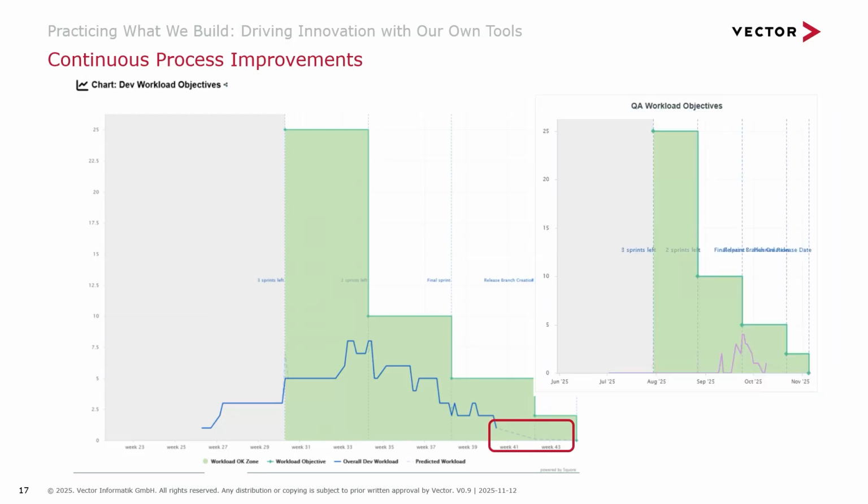And there is, of course, a similar chart for the workload on the QA team. So when you look at both, you can easily know if you will have to pull more resources to help with testing as the release date approaches. The benefits from learning about the state of your tickets is clear here, but you could also add more information as a basis for your decisions by factoring in the quality of your code or the test environments that still need to be created. Anything you can measure basically can go on this chart. And it can all be shown relative to how much time is left until your release date.